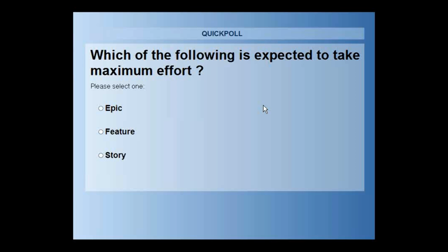So the question that came is, where is theme placed in the hierarchy? In the SAFe requirement hierarchy, we do have investment themes, which are strategic themes on top of epics. A theme represents the large strategic direction, and on the basis of a theme we create epics. So rather than just themes, we talk about investment themes or strategic themes, and they are ahead of epics. This is how the SAFe artifacts work. We should not relate it to the general definition of theme, where a theme is a collection of user stories, the way we look at it in generic PMI-ACP related content.